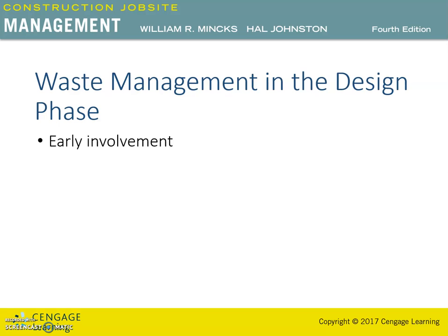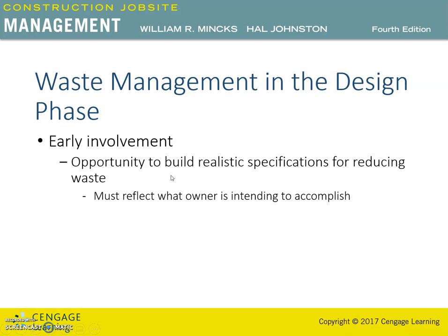So, waste management in the design phase. Contractors are often active in the design phase when involved in design-build, construction management at risk, and agency construction management contractual relationships. This early involvement in the process provides the opportunity to help build realistic specifications for reducing waste in the construction process.